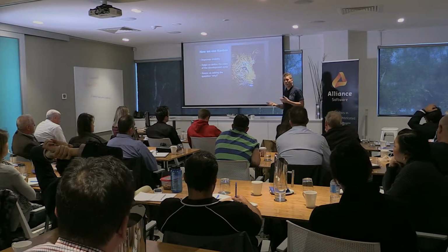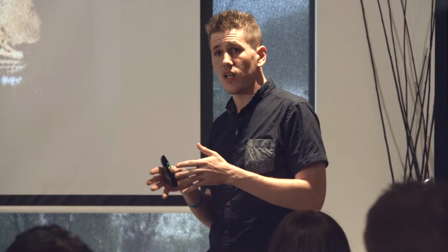Electronic Kanban boards have fantastic stats tracking, or a lot of them do, that tell you how long things are spending in different phases. You can actually say with some accuracy that we're spending 30% of our time in the testing phase, and think, why is that the case? Is that a reasonable amount of time? You might find out that it is, but it keeps you asking, why are we spending as much time as we are on different phases? Why are cards spending longer here than they should?